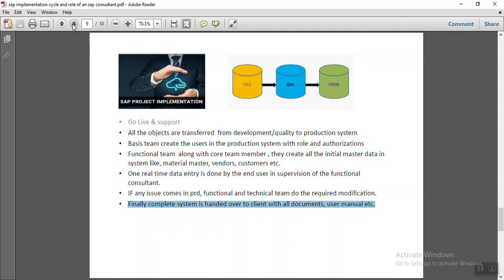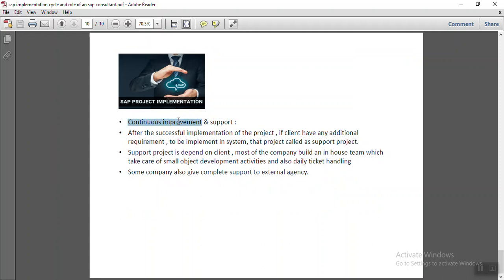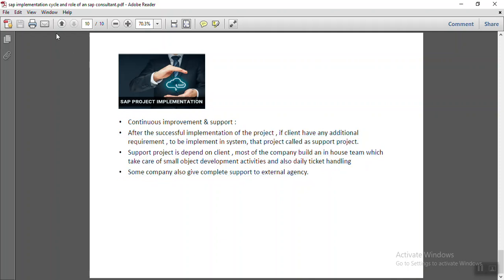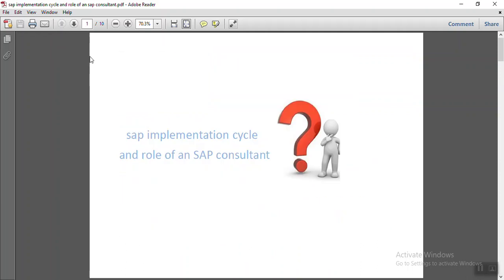Once go-live is done, there is a phase of continuous improvement and support. During implementation, only must-have functionalities are delivered and some developments are kept pending for after go-live. Most of the time after a successful implementation, the client makes an in-house team to handle support, and many companies also hire an external agency for regular supporting activities like upgrades, modifications, and new development. This concludes the SAP implementation cycle and the role of SAP consultants in an implementation project.